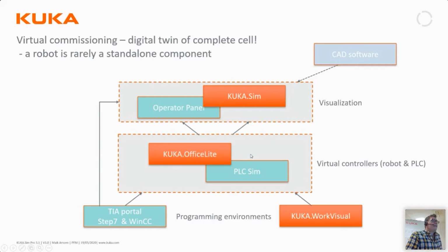That means that the only add-on work you have to do to create a simulation is whatever layout you need to create in KUKA.Sim, which you probably have done in many cases according to the poll we did already. So connecting these environments together to really create a simulation is not that big of a work effort that you might suspect it is.